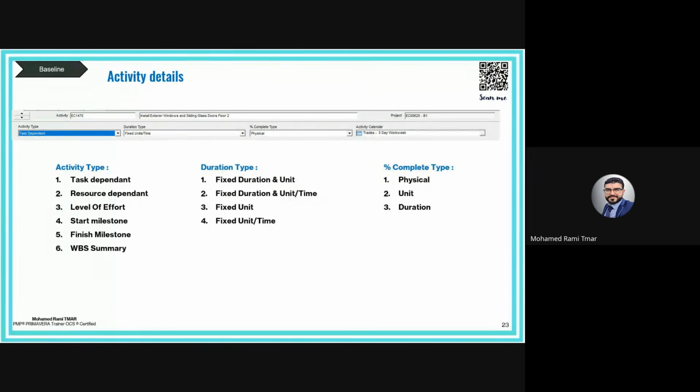Okay, and usually there are contractual milestones defined in the contract, and we usually use those milestones in the first page of the schedule to give us a high level summary of the schedule. The top management or the sponsor will not need to go through details to read, for example, 50 or 100 pages of schedule.